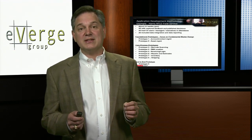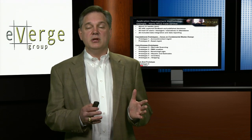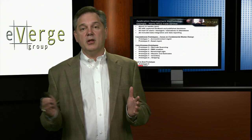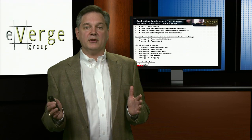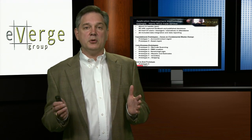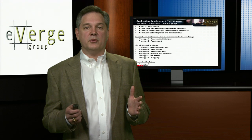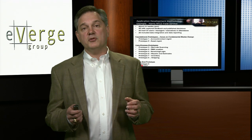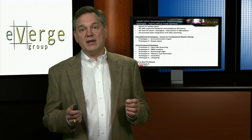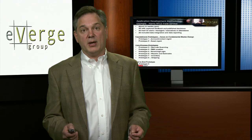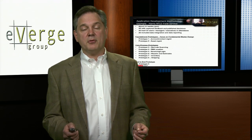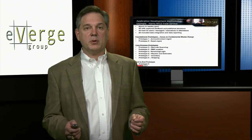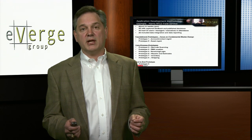You can do things differently on your projects. Every one of our applications — CRM, ERP, HCM, MDM, business intelligence, and Hyperion — takes on a different nature, and the practice director will speak to you about how their unique characteristics are integrated into Precision Fit. For example, with barcode scanning, if it's complex, the project team may decide to have two or three different prototypes for that, maybe a couple of weeks apart. The same applies to other components — if they're complex enough, it's okay to have a series of prototypes within a particular stream.